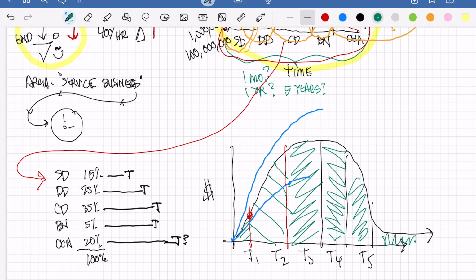At any one time under that curve, you have a delta. And at any one time under this curve, you've got a delta in, let's just say, staff or planning availability with what you have. And so anytime your curves don't align for any number of reasons, that could be a problem. We see this a lot in CCA, actually, quite frankly, where we anticipate a certain amount of effort in construction contract administration, and it ends up not happening for any number of reasons.